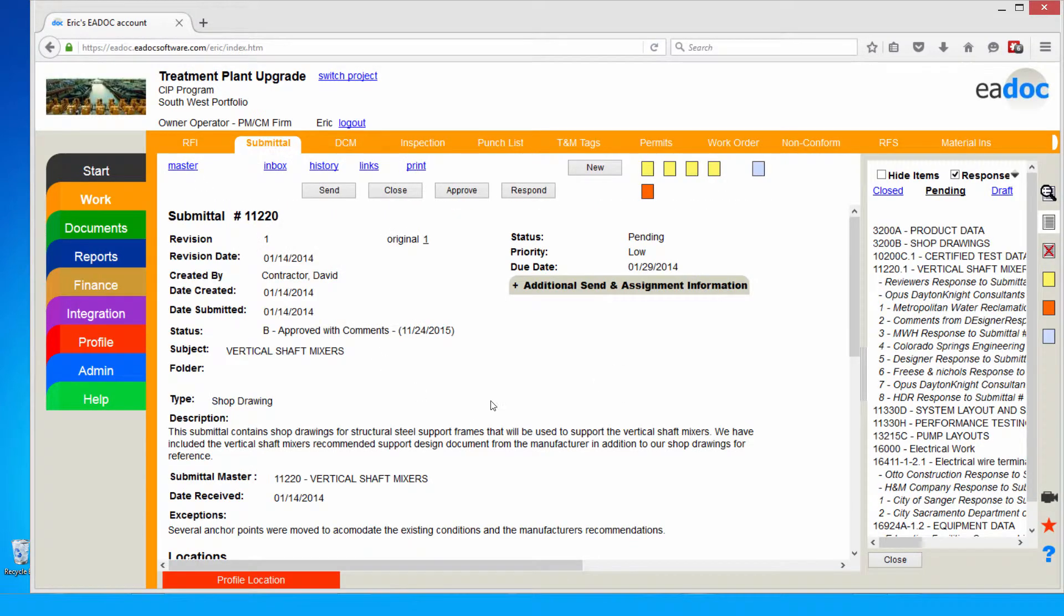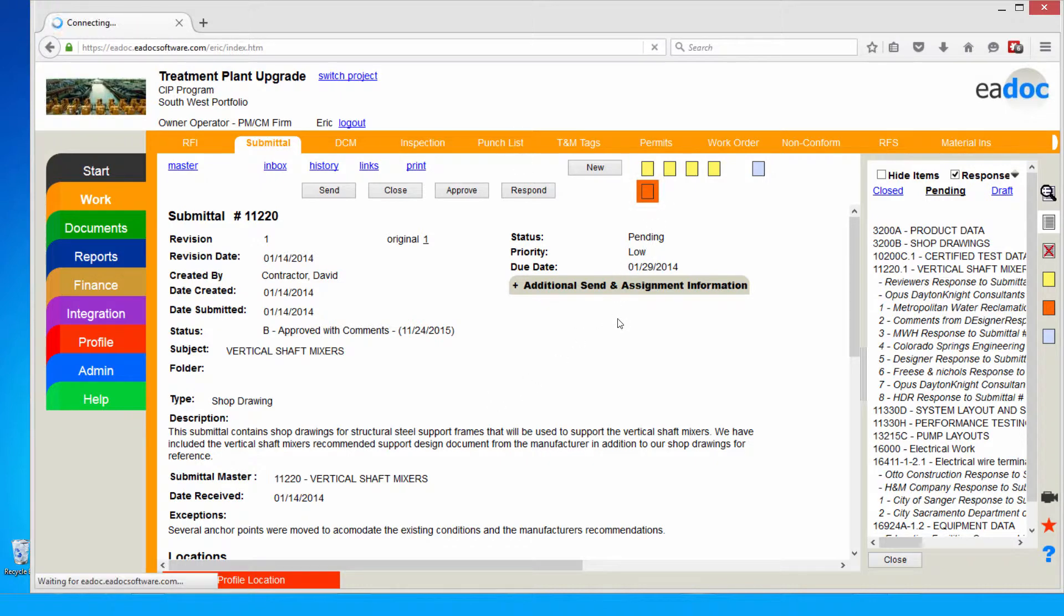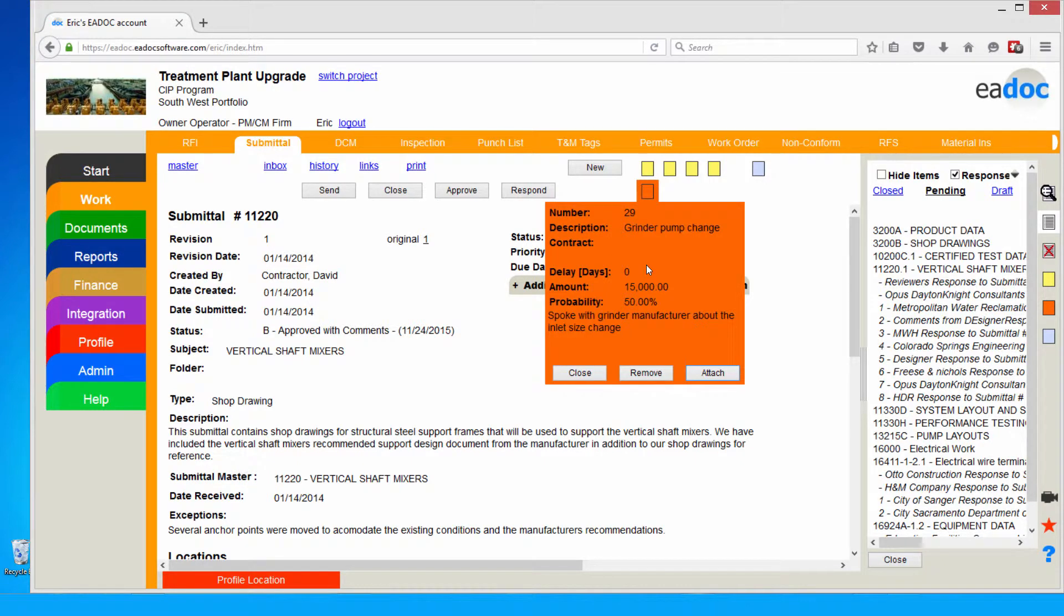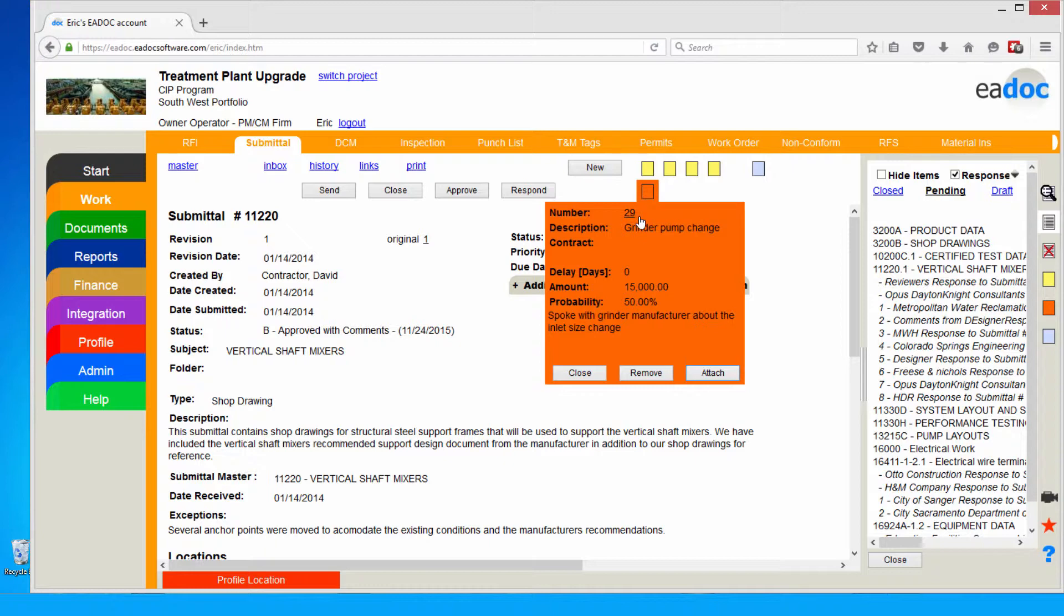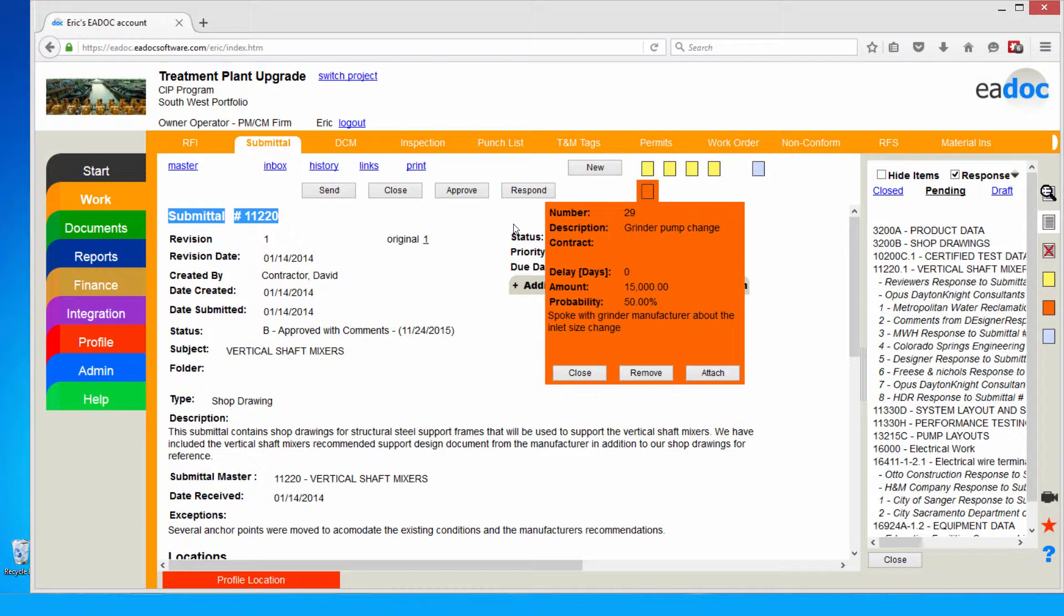With Bentley's capital project management system, we're not just managing the documents, but we also want to be able to tie it to costs. One of the whole reasons why we manage documents and communications on projects is to be able to identify issues on the project, track those issues, and then try and mitigate the cost or schedule impacts. Within our capital project management tool, we have what we call our risk item. This risk item allows me to identify issues or risks on the project that could have a potential cost or schedule impact. What's great is I can link these risk items to supporting documents and communication like the submittal. These risk items are internal to my organization. So this way my consultants can't see it, my contractors can't see it. This is a tool for me as an owner operator or a PMCM firm to track and control the risks and issues on the project.